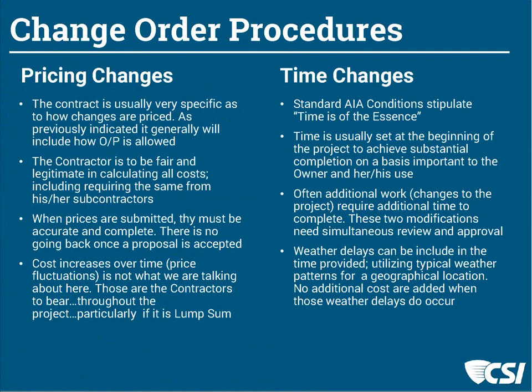Weather is another issue in the mix. The contracts I'm familiar with establish a required number of weather days the contractor must include in the project — days they cannot work. If they go beyond that and can document by comparison of the last five years of weather cycles that conditions were unusual, they are able to receive those additional days. Sometimes there's a weather delay that doesn't affect cost, and you're able to include those adjustments at the same time you make other contract modifications.